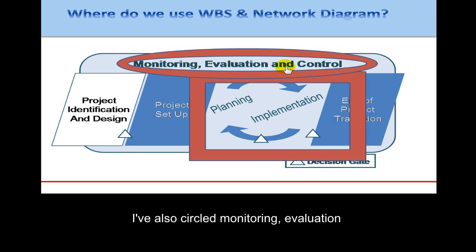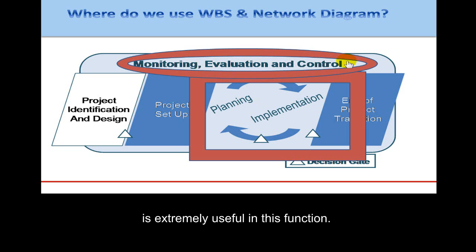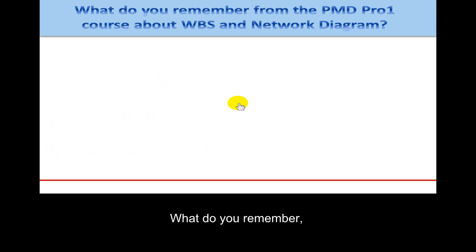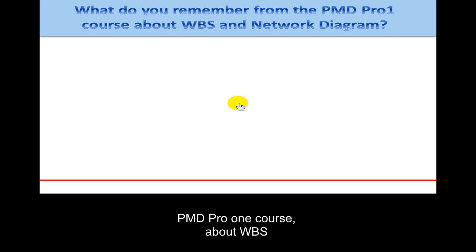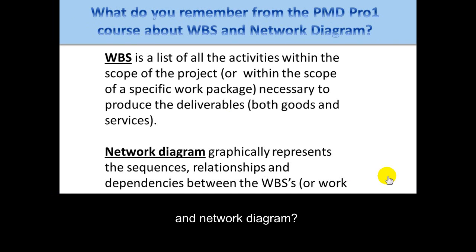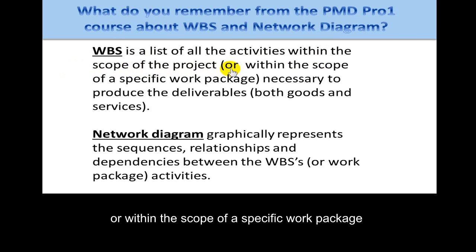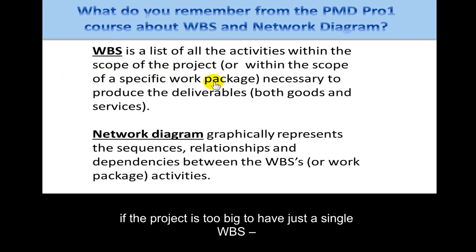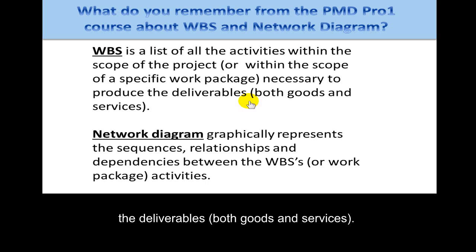I've also circled monitoring, evaluation, and control because the Work Breakdown Structure is extremely useful in this function. The WBS is a list of all the activities within the scope of the project, or within the scope of a specific work package if the project is too big to have just a single WBS — all of the work necessary to produce the deliverables, both goods and services.